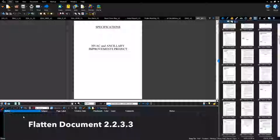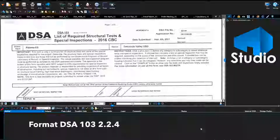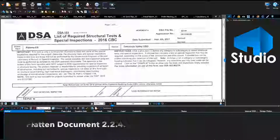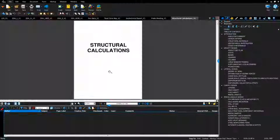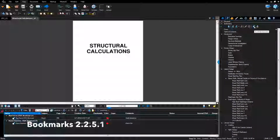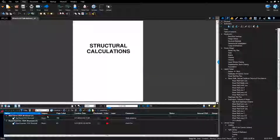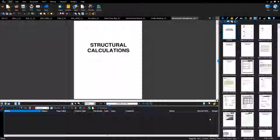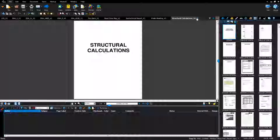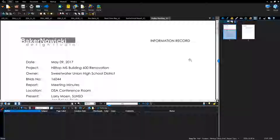Confirm the document has been flattened and that there are no markups in the bottom tracker. Verify supporting documents: confirm bookmarks have been created and that there are no broken bookmarks by clicking the audit bookmarks button. Confirm the document has been flattened and there are no markups in the bottom markup list. Review all formatting for all supporting documents — they should be flattened, and if they are greater than 30 pages, they should be bookmarked.